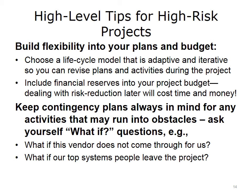It is important to build flexibility into your plans and budget. Some lifecycle models can adapt better to uncertainty than others. Adaptive, iterative, and agile models feature short cycles so you can respond to events and conditions as they occur, giving you a chance to map out effective next steps in real time. Keep contingency plans for the obstacles you might run into during your project. Continually ask yourself what-if questions: What if your top systems people leave the project? What if a vendor does not come through? Document your response plan in concrete detail — for instance, identify contingency funds that could be tapped rather than simply noting that you will build financial reserves.